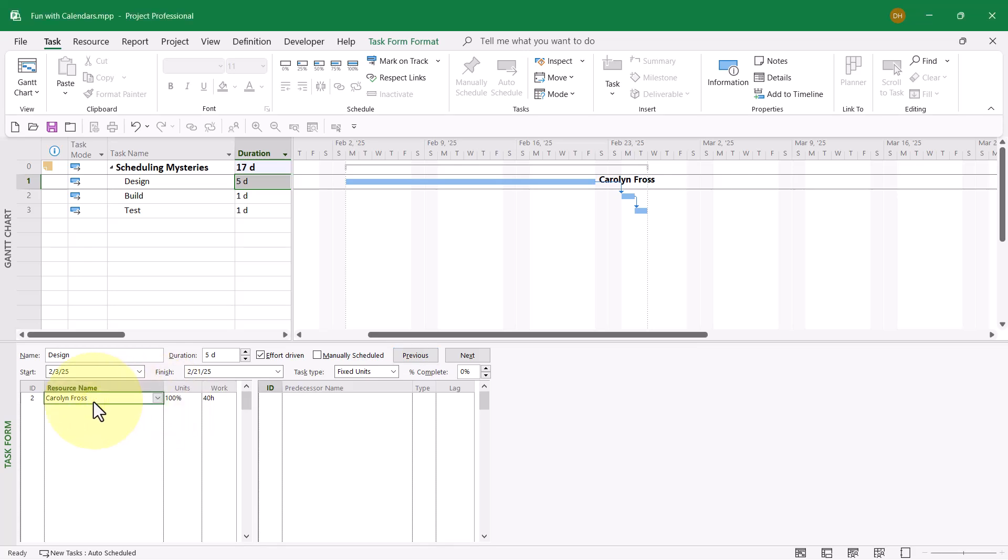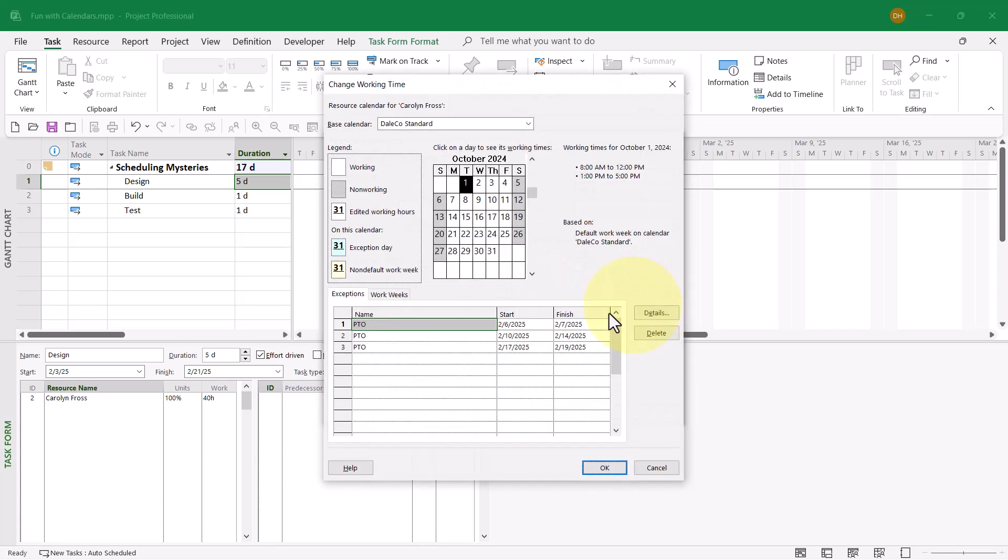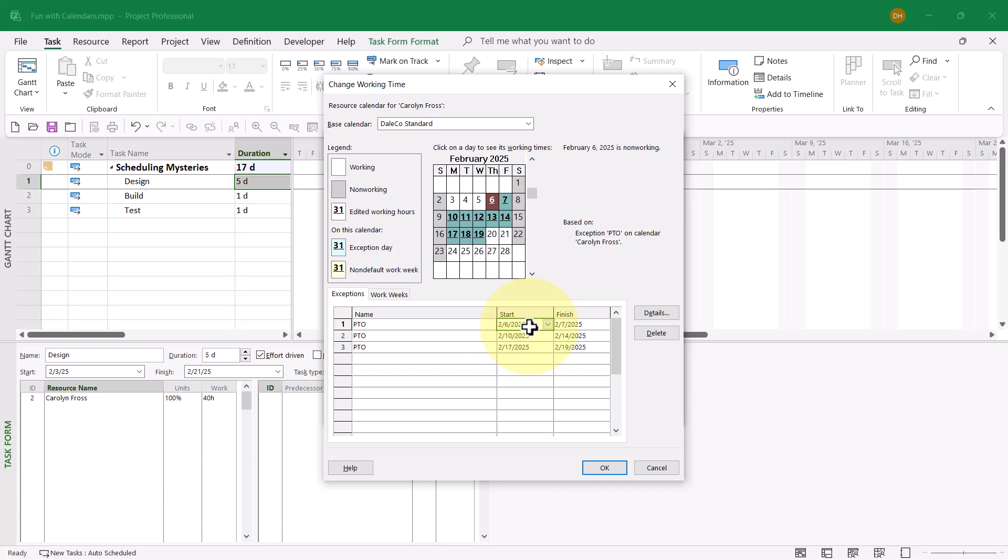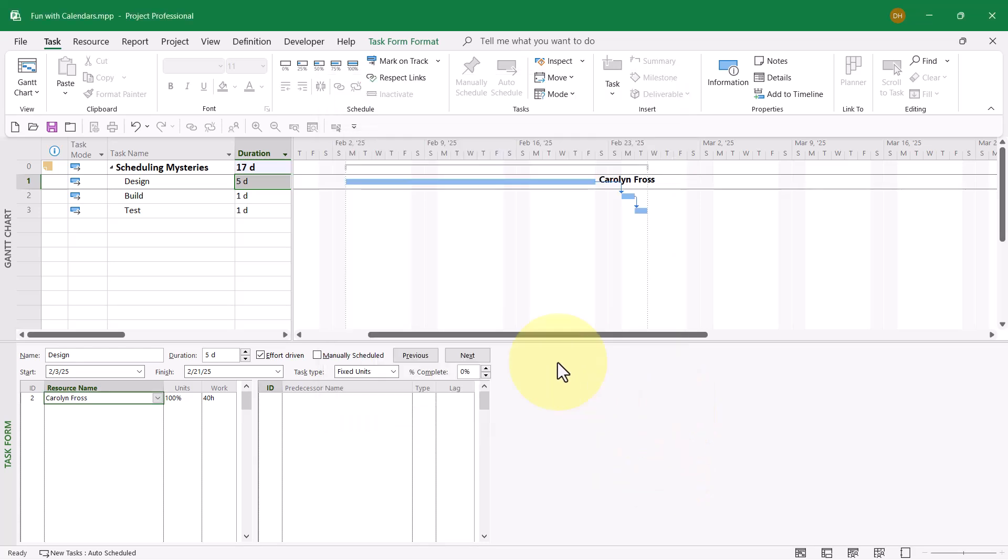I'll double-click the name Carolyn Frost and go to the Change Working Time Dialog for her. Here's the source of the problem. During the week of February 2nd, she is on PTO Thursday and Friday. During the week of the 9th, she's on PTO the entire week, and during the week of the 16th, she's on three days of PTO. That is controlling the schedule of the task. But is this schedule actually right?